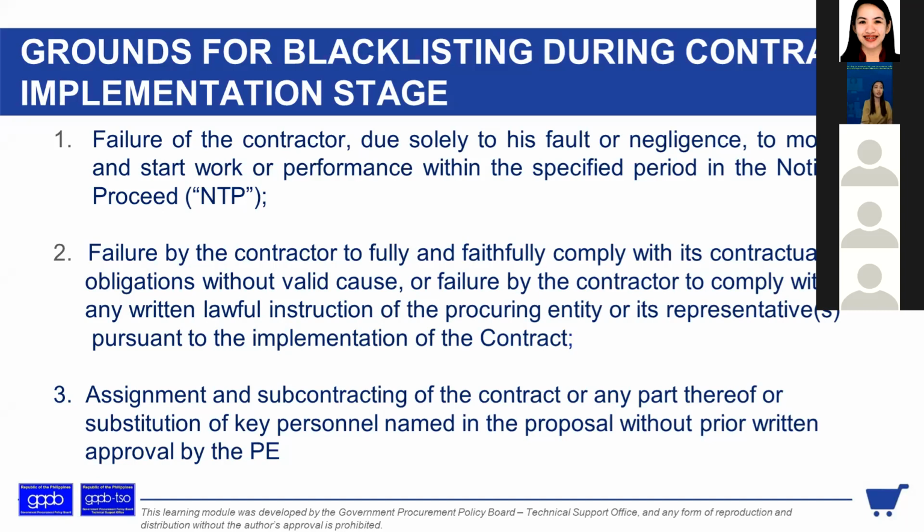Request sa contractor ng extension ng delivery or performance niya, yung end. Tapos, yung performance security pala, hindi din niya accordingly in-extend. So, if ever talaga, hindi talaga niya ma-meet yung requirements ng contract, yung obligation niya under the contract, baka wala tayong habulin na performance security.